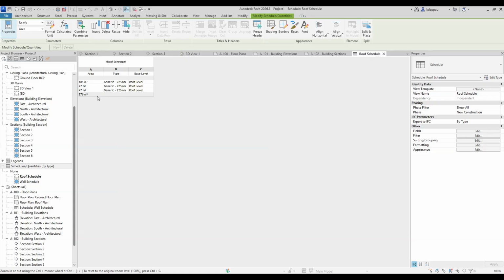I don't need somebody from Domwood to come and climb my building, do measurement and tell me that I need 276. The only thing I will do is calculate it and get 276. Then I'll let them come and do their calculation. And when they tell me that the calculation for the roof is 350 square meter, then I can hold them on that: my friend, you are lying, because when I did the computation on my machine, this is the value that I got.